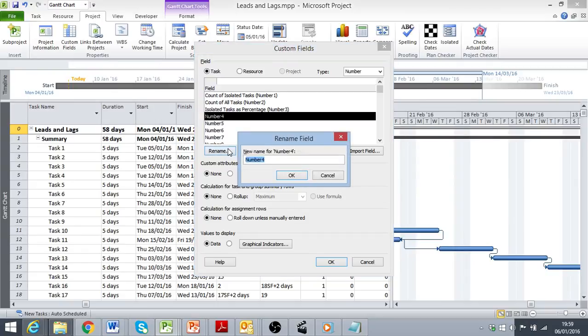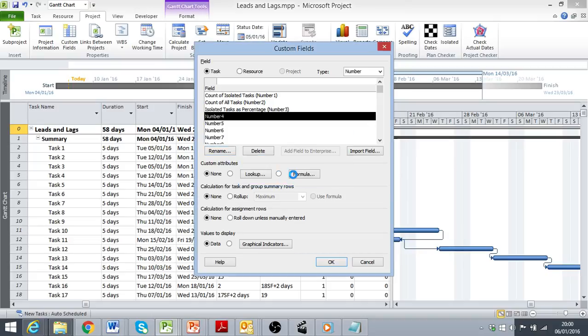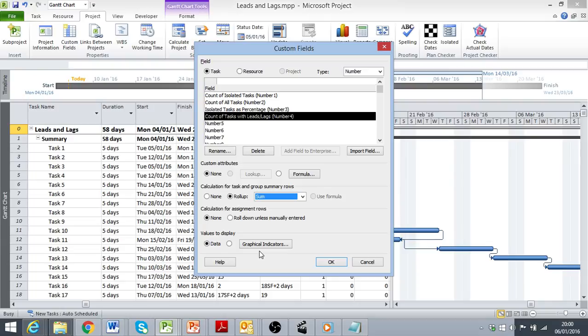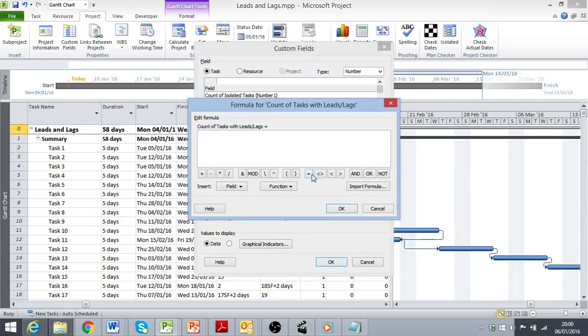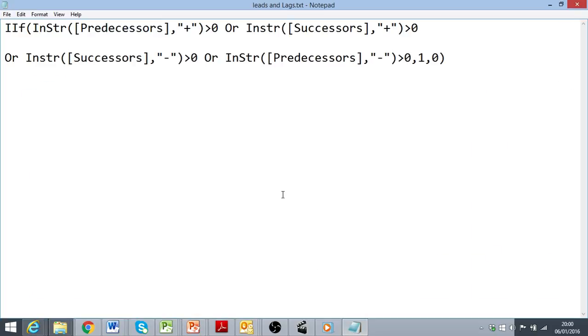And I'm going to rename this count of tasks with leads and lags, and for my rollup, I'm going to use the sum option again. And for my formula, I'm going to make use of a string function in the formula definition to identify where the plus or minus symbols are being used. I've actually created that in notepad, so it's a little bit easier to see all the commas and the inverted commas and the symbols.